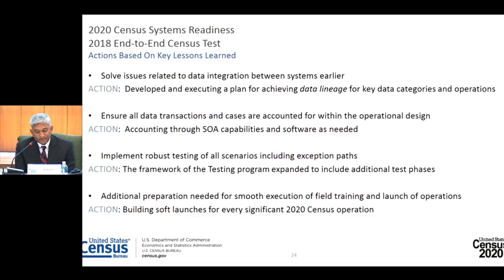A soft launch is a small-scale execution of production cases by production users. The execution of soft launch cases is closely monitored by headquarters subject matter experts, and the results are verified by IT specialists. We also established a working group with the help of the technical integrator that will focus on verification of system readiness, specifically for the training sessions.